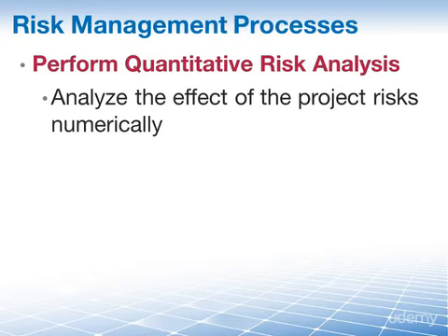The process of numerically analyzing the effect of identified risks on overall project objectives. And the key word here is numerically. At the end of this process, we will have a number, usually a currency figure. It'll cost us 100,000 euros, $250,000 if this risk occurs.